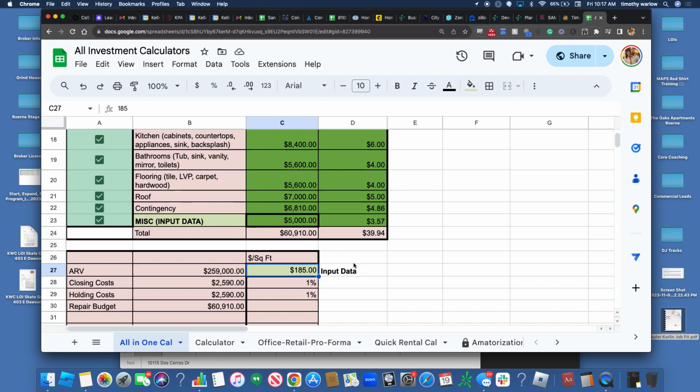Cedar Knoll was a huge project. Huge. Yeah, that was roof, HVAC, everything, cosmetic, countertops, the addition, and that was done in 35 days. Wow. And that was a crew of like 4 guys. So you can run it fast as long as your crew is only working on one project at a time. About 4 or 5 weeks it can be done.